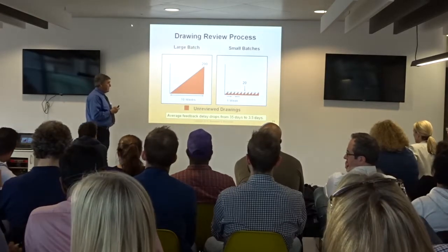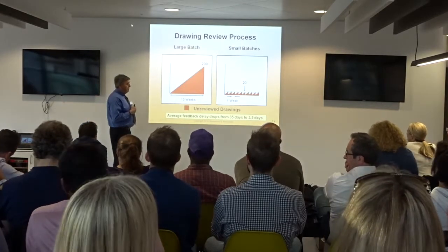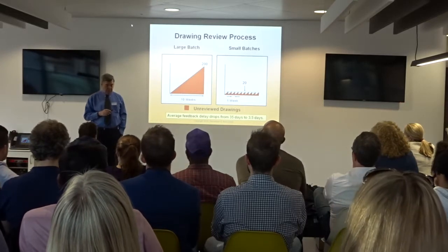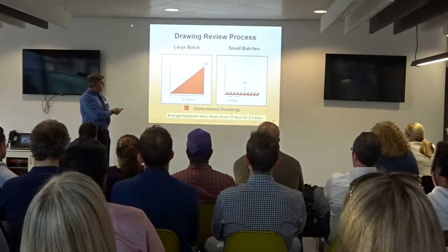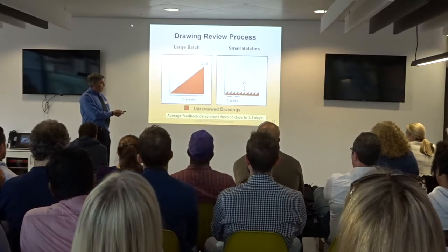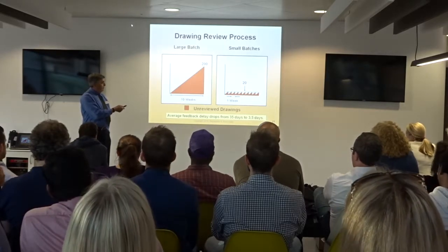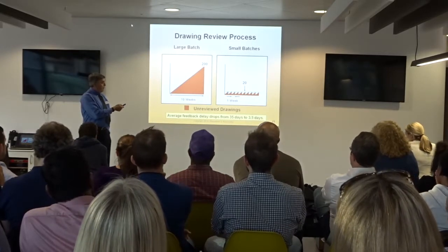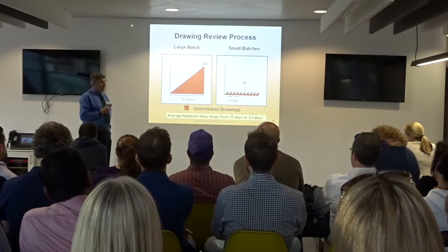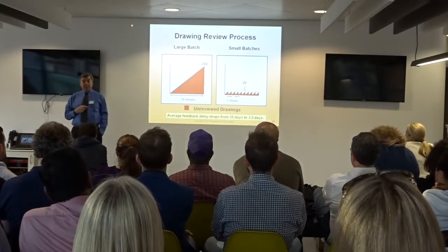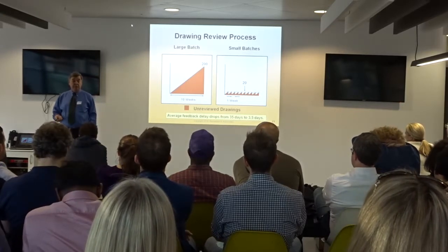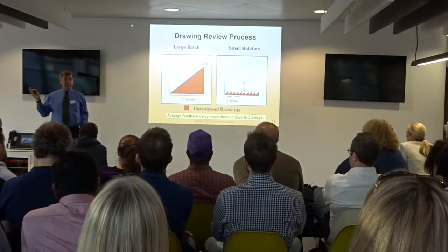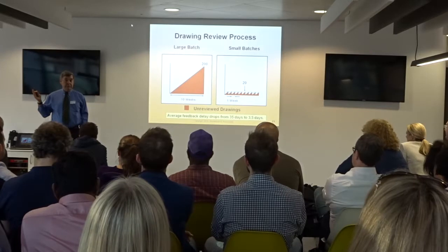I usually use the example of how people review drawings in an engineering process, where I take the example of one company that would complete 200 engineering drawings over a 10-week period and review them all in one big bang drawing review at the end of the 10 weeks. I contrast that with another company doing the same type of product who reviews drawings once every week. Every Wednesday afternoon, 1 p.m., they review whatever drawings were done in the last week.